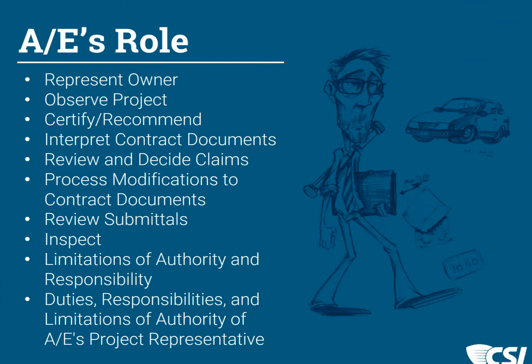We're also reviewing and deciding claims should they occur, either by the owner or by the contractor. And those would initially come to us. Documents often contain a reference to the final decision maker in a project, and most often, in my experience, that is established by the architect or engineer as the architect.